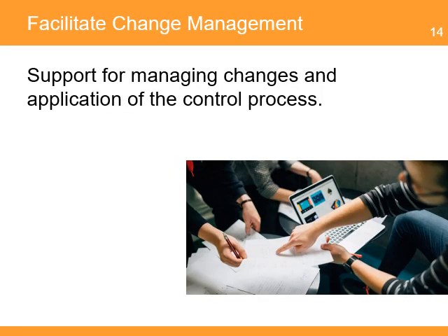The PMO can function as a change control board for program and projects by providing support to administer the change management control process, authorizing changes, and escalating the approval of critical changes to the organization's executive team.